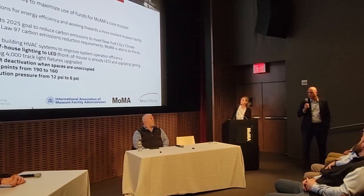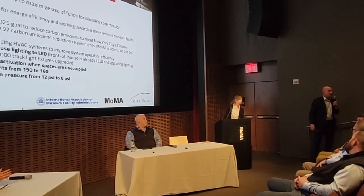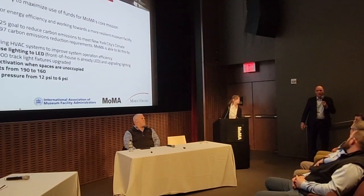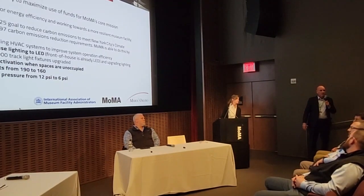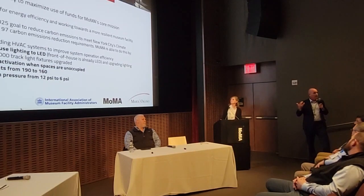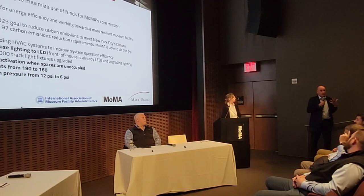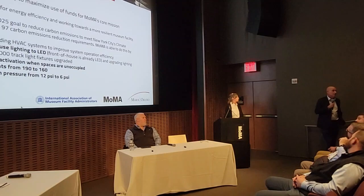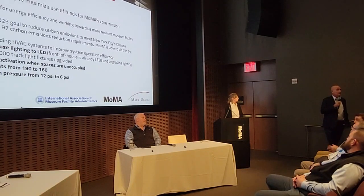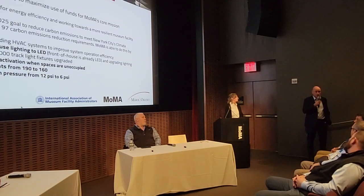Joe mentioned earlier that we only replaced 3 of our 80 or so air handling units, and they recommended refurbishment of the rest. And our sustainability team, and we have a team of consulting engineer, Rowan Butkus, a mechanical contractor on site, and an electrical contractor, the filter that people put things through to make decisions were based largely on energy efficiency and extending the life of the equipment. Because we knew we weren't going to replace our air handling units for at least a couple more years. That's still probably in the 3 to 5 year range.